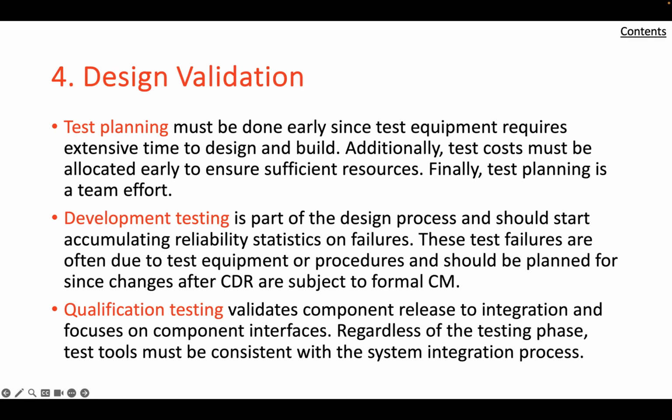Prior to fabrication, reviews are held between the designers and fabrication personnel to assure that what has been designed is within the capabilities of the facility that has to be built. The implementation process is seldom unidirectional. Design deficiencies are often discovered and corrected during implementation, even before testing, especially in hardware components. Even though CAD has greatly reduced the probability of dimensional and other incompatibilities, it has to be anticipated that some changes will need to be made in the design to achieve a successful functioning product.